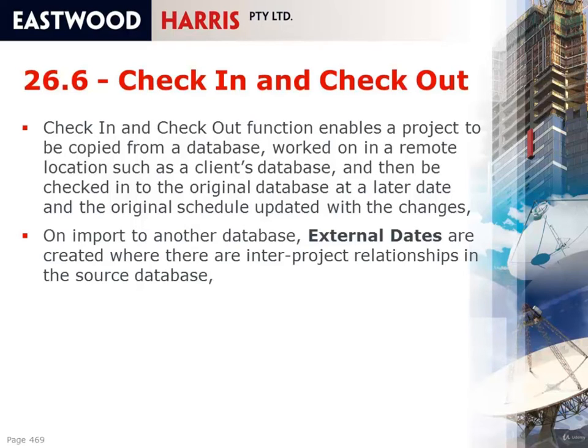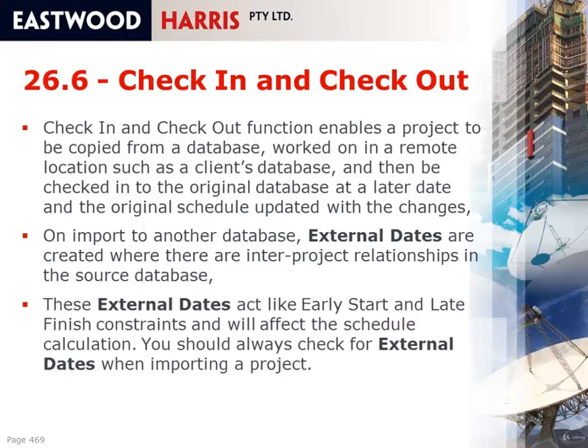On import from another database, you'll find that external dates are created when there are inter-project relationships in the source database. So if you're exporting one project and that project had relationships to other projects, then these are represented as external dates. You'll find external dates act like early start, late finish constraints and will affect the schedule calculation. Therefore, when you import either an XCR file or you check in or check out a project, you should always check for external dates. So let's move to P6 and have a look at how this operates.